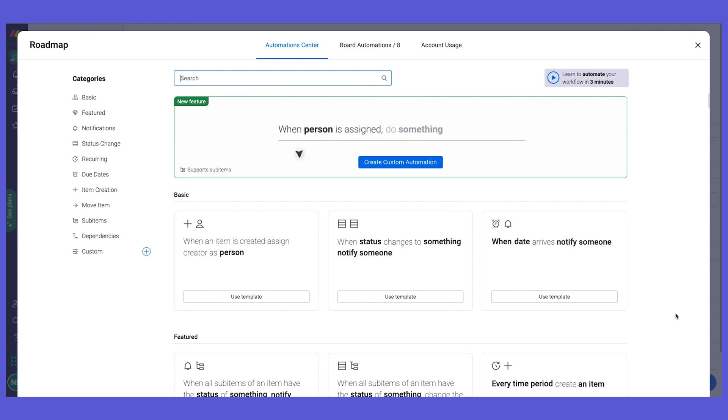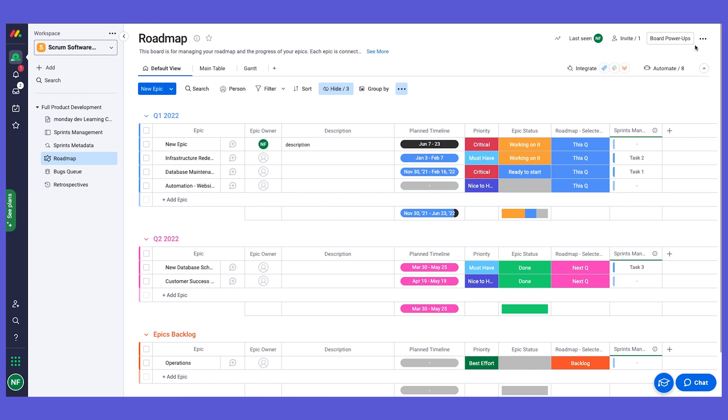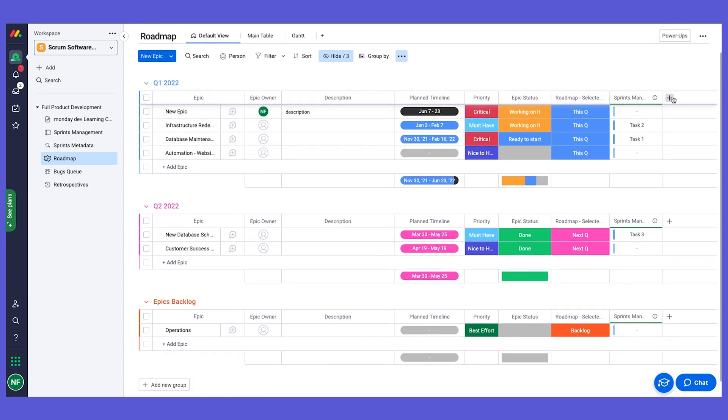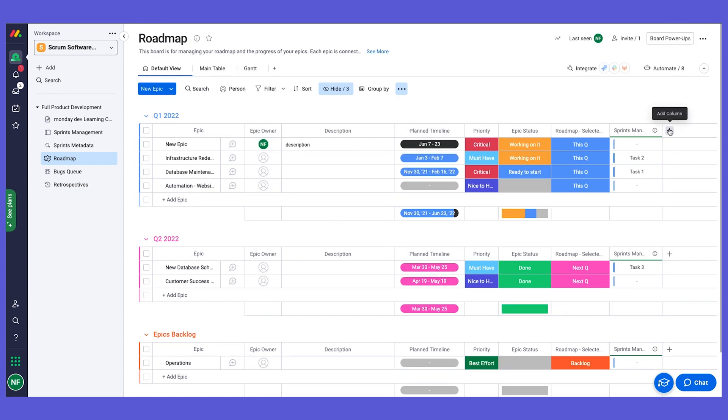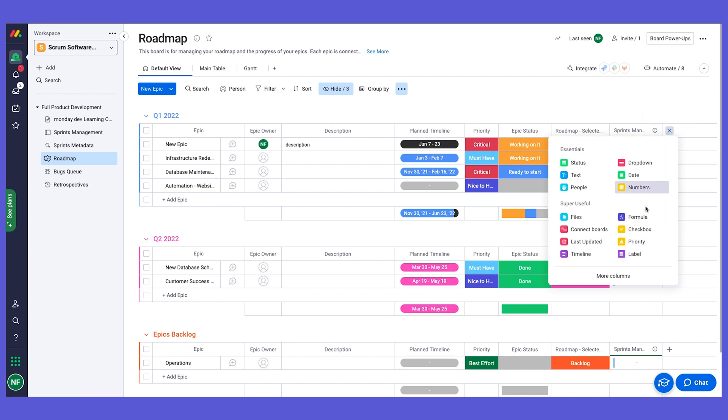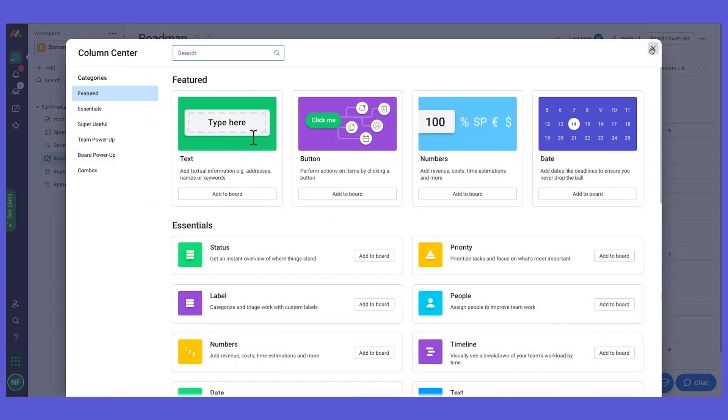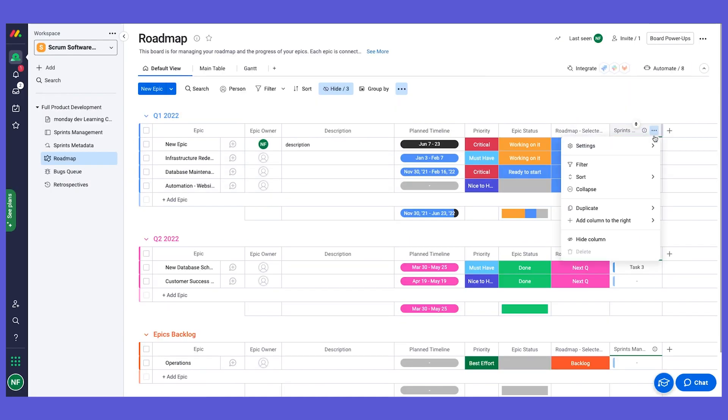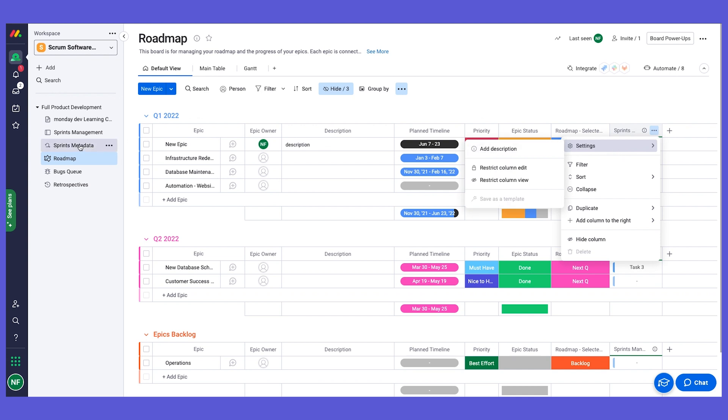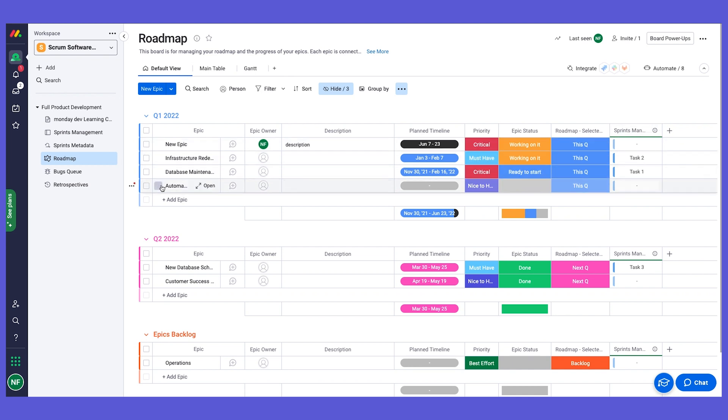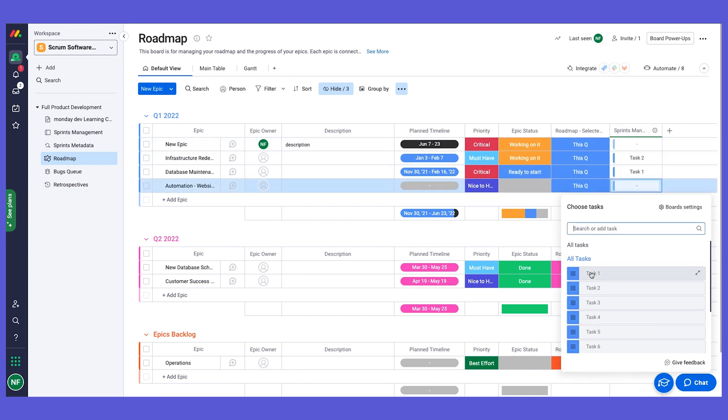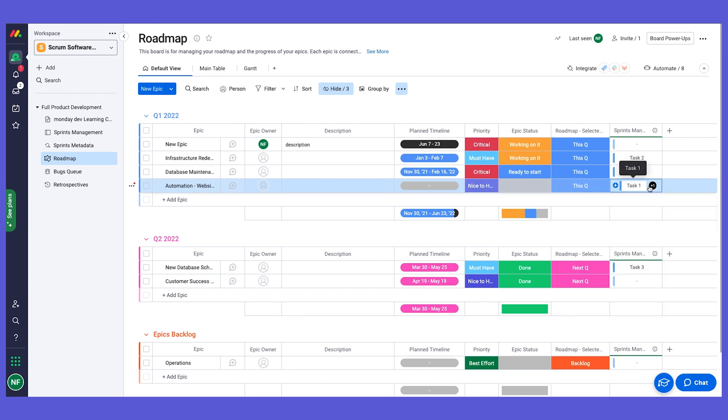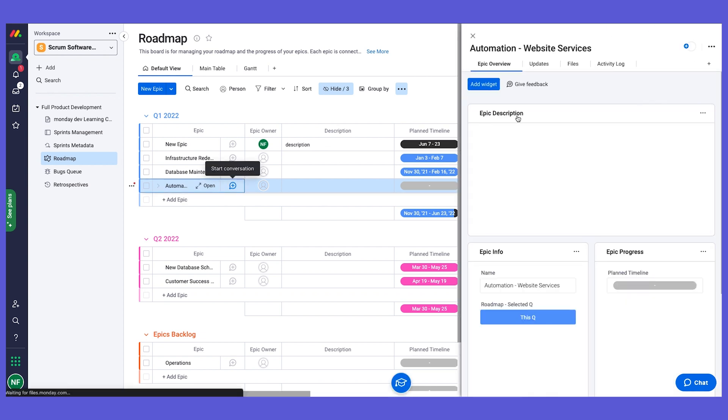Let's talk about the link to the sprints board. What we're using here is a connect boards column. If I go here, you can see that I can add a new column and this is a connect boards column. We have many different types of columns that you can use. What we added is a connect boards column and we linked this column to the sprint management board. Now if I have an epic and I have tasks on the sprint management board, I can go here and select the relevant tasks to assign to this specific epic.